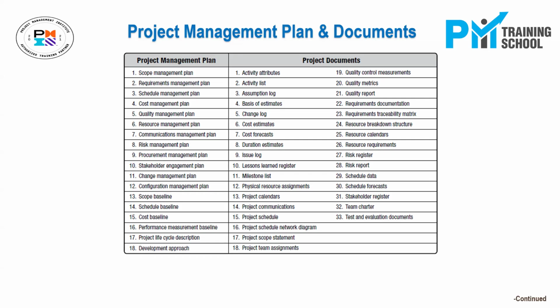Exactly. Moreover, a change request may also affect some of the calculations or the documents in the project documents, because these are also important documents which can be referred to. We don't want them to be outdated. So as a result of a change request, if your schedule has changed, maybe you intend updating the schedule data, schedule forecast, or something else like that. So all of these documents may also be amended and kept in configuration management as per the change request approved.